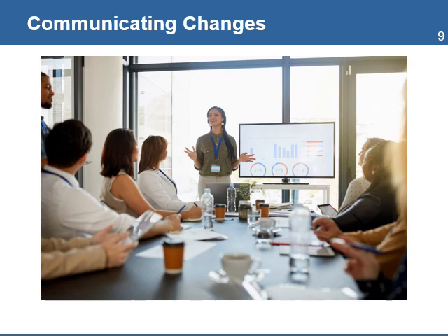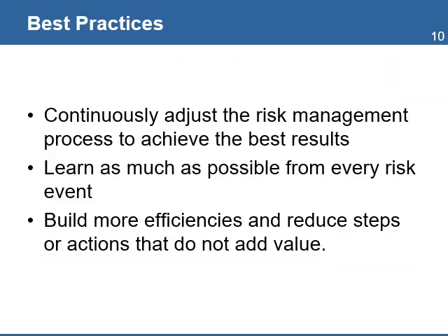As a project manager, you are responsible for communicating to all key stakeholders the changes to the risk response plan. The communication should include the most important changes that were made to the plan, with a special emphasis on the risk priority list and the names of the risk owners. Communication to the stakeholders should highlight the new risk priorities and the actions you have devised to mitigate the impact of those risks.